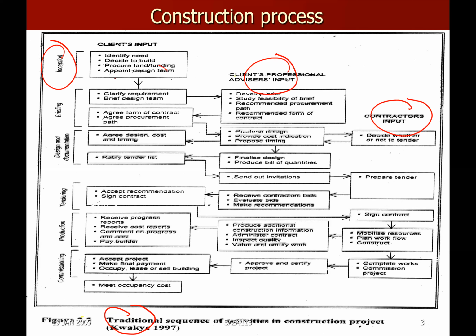Appoint design team. Once you are clear on certain things, then you start to appoint the design team, meaning to say the consultants. Who will be the first person that you call? You normally call the architect first. The architect normally becomes the principal or lead designer. Then you do briefing. The client will do the project briefing. The project brief normally